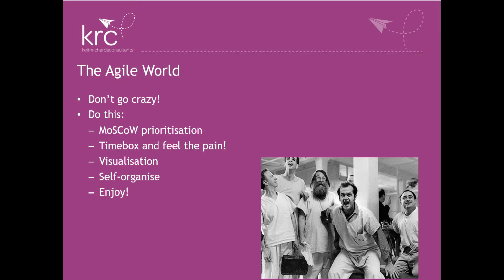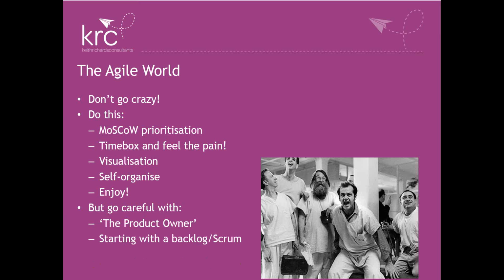Normally Agile's a lot more fun as well, but there are some hang-ups with Agile, things like a single product owner, a single point of failure. It sounds very attractive, but only on small projects do I know that that actually works. And I almost would say they're not even projects, they're more what I call product development. If you've got a big complex project and one single voice of what the customer wants, it's easy to manage, but it often holds more problems than it solves.